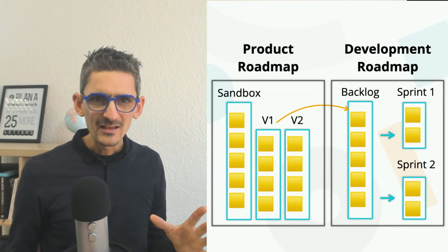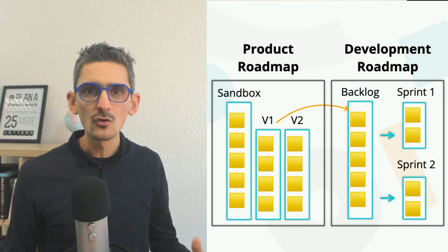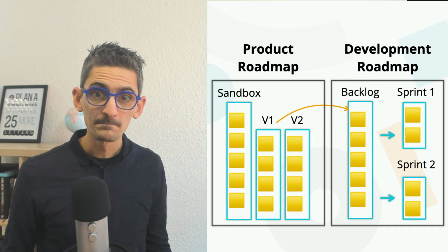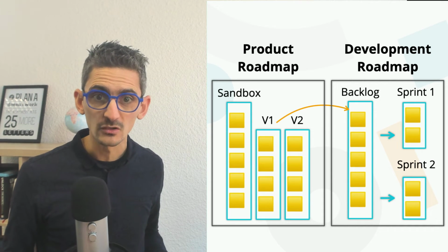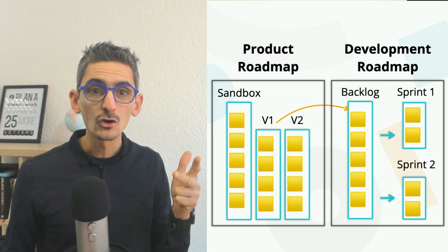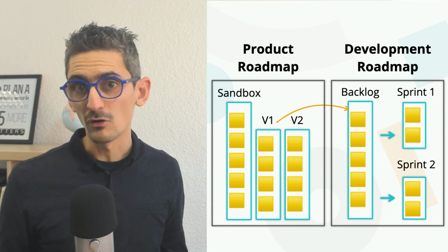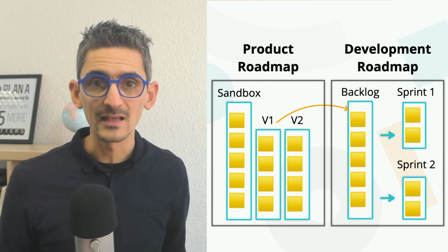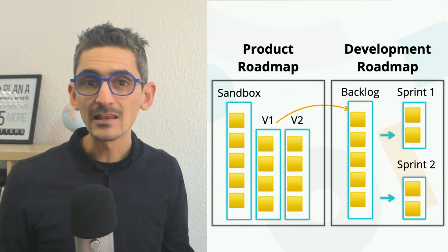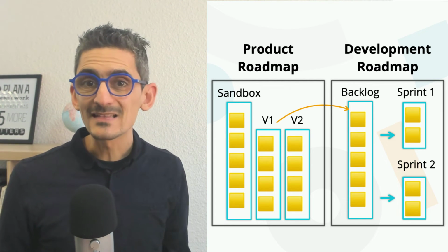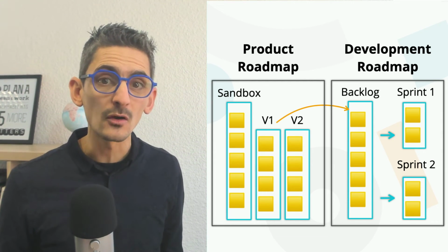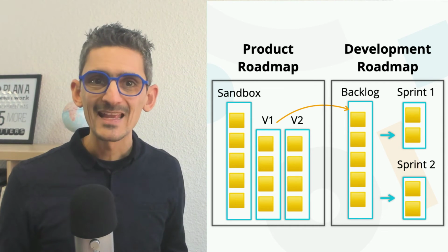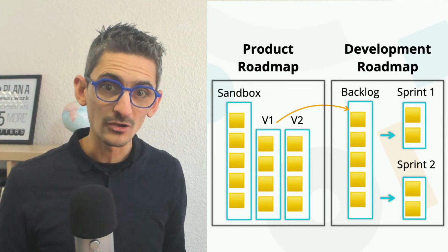So in conclusion, if you really want to avoid wasting time in long meetings with developers, prepare your roadmap from a strategic point of view, taking into consideration your product vision, your customers' needs, and the costs of features. And the roadmap is usually defined by the product manager or directly the founder in the early stage, if you don't have a product manager yet, and the CTO, of course, who will participate to provide a general estimate of the cost of each feature. And I mean a technical estimate. And that's how we come up with the product roadmap.